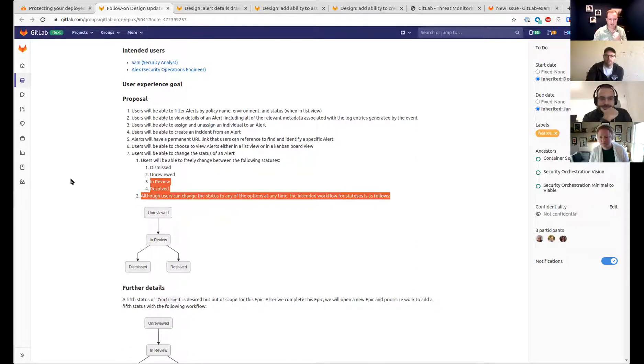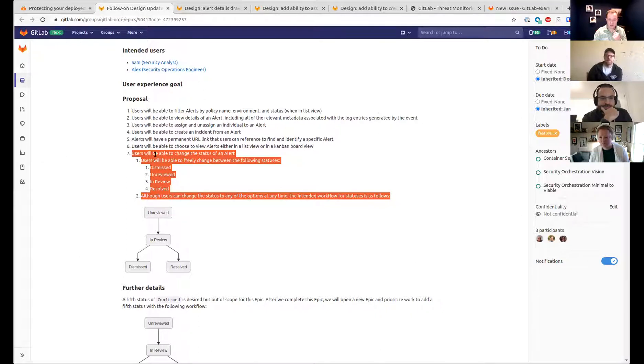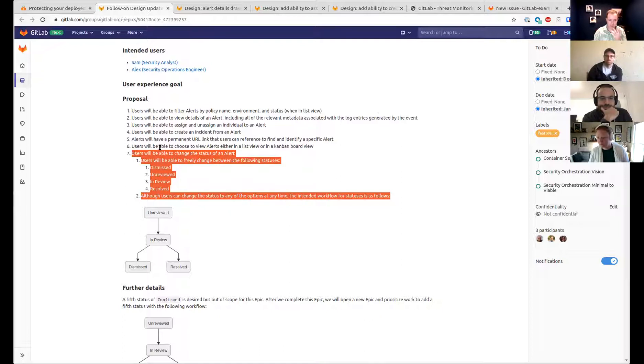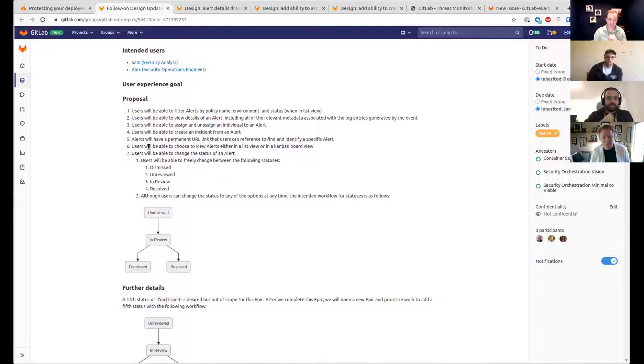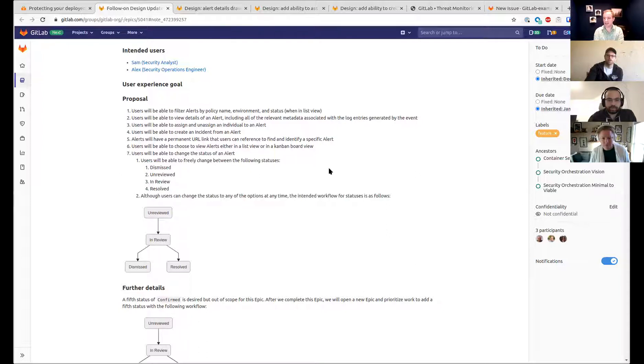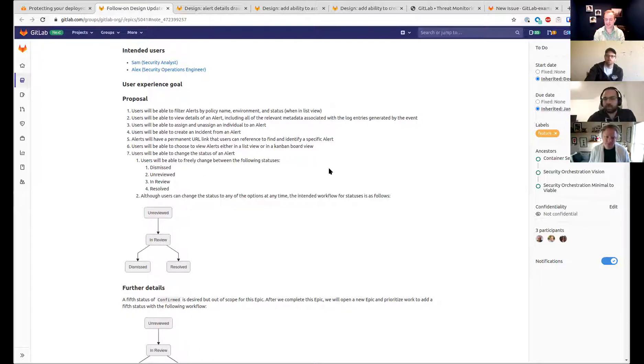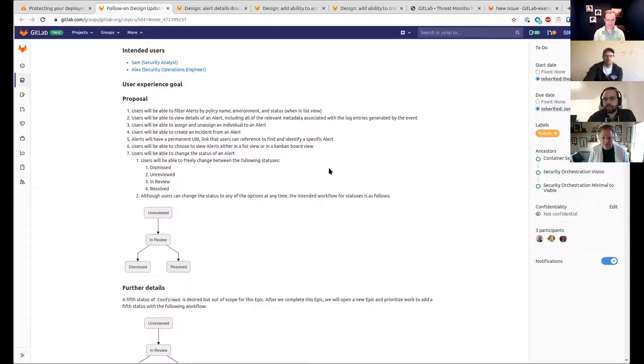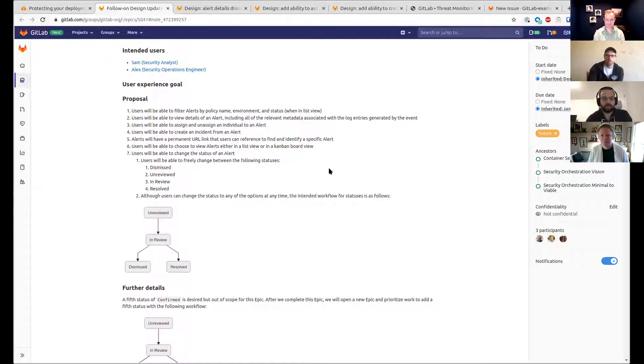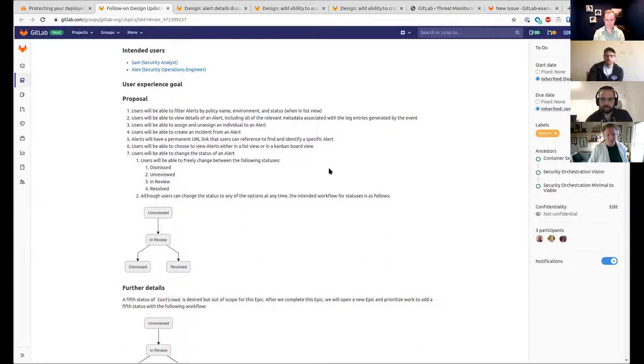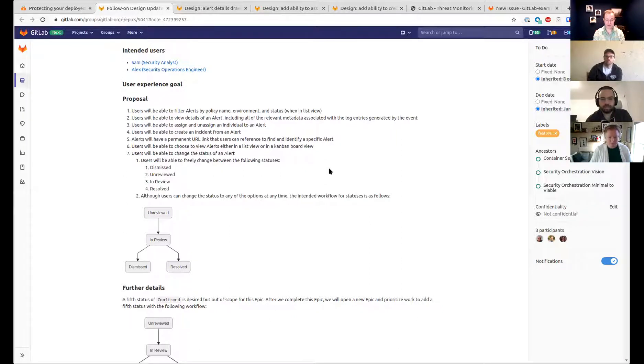Okay, great. So I will, to avoid confusion, I'll remove this from this because we already have it. So you'll just have these six and I think they are more or less in priority order there amongst themselves. So technically I think we could release any one of these independently. I don't think there's any reason we have to wait for all six. They're all very iterative incremental improvements. So I would say, let's just go down the list and see how many we can get done here. And in 13.8 or 13.8. Yeah. 13.8. Yeah. Once we release this MVC and I remove the feature flag that is currently hiding it, I won't have a feature flag for any of these. Well, that's not true. I'll have a feature flag for the Kanban board because that is quite a bit of work. But the other ones seem like they can be done incrementally without a feature flag. Awesome. Yeah. That sounds great.